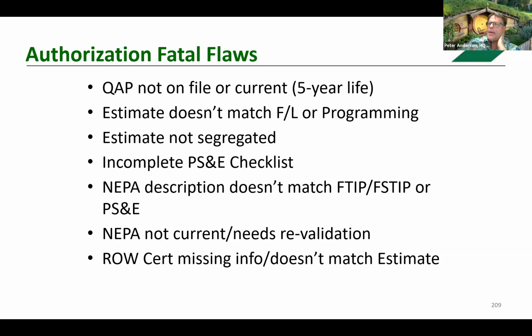When I talk about establishing the PED for construction, we use the board council acceptance of completion. That's equivalent to the contractor being released from the project. The contractor is done, and so that is that date. Then 1 year is added on top of that to establish the PED. So that should take care of that.